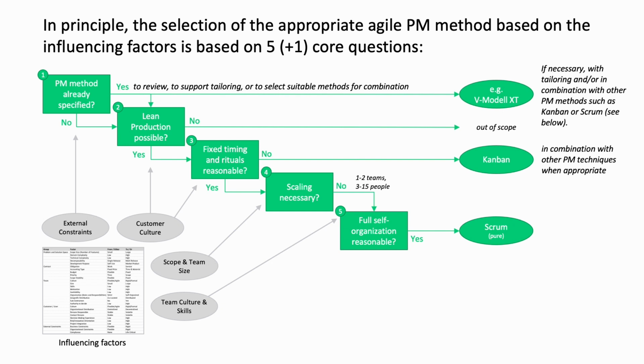If the answer to question 3 about the meaningfulness of organized and clocked agile production is not a clear yes or no, but rather somewhere in between, a defined method in this intermediate area is, for example, Scrumban. Scrumban goes back to Corey Ladas and his book from 2009 and in short works more like Kanban in terms of clocking, but adopts, at least as it is usually lived, the rituals of Scrum. The original approach in the definition of Scrumban was that of an optimization of Scrum, derived from experience through the omission of strict timing and organization often perceived as rather obstructive.